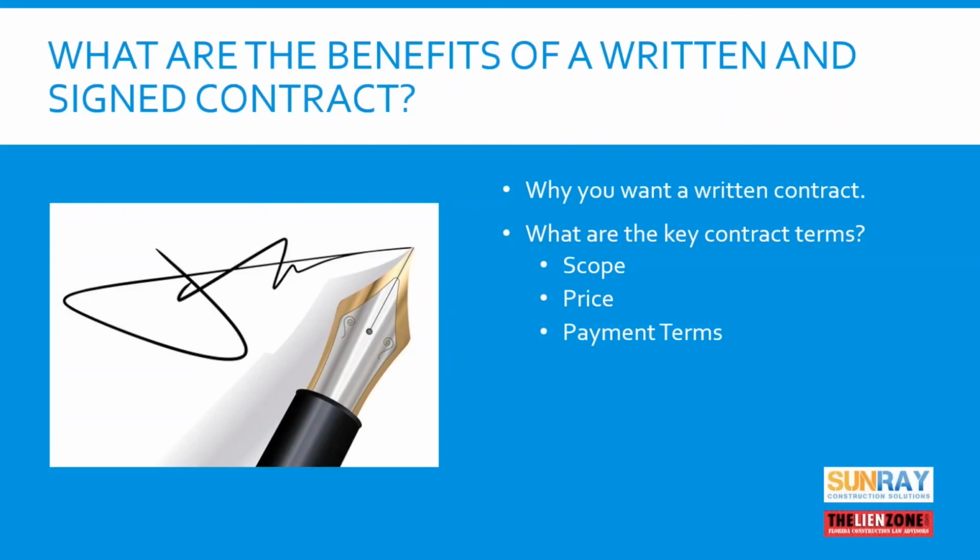Payment terms, also very important. When and how will you be paid? On larger projects or projects where you may be a subcontractor to a general contractor, the most significant issue is the pay when paid provision, which is a contract provision that says that the contractor doesn't have to pay you as a subcontractor unless the owner pays the contractor. Understanding how that provision works, when it's enforceable, how it can be made unenforceable, those are things you need to understand.